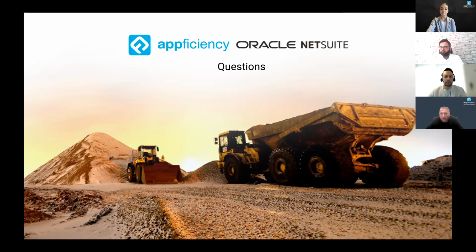So part of the demo that Joyce did for us, she mentioned that, hey, you have the option to override our calculation. So when you use the option, the setup is based on the override, you're technically using the fixed price setup. And if you don't override, the system is smart enough to understand that, okay, this is a cost plus contract. I need to calculate all the percentages based on the cost that you incurred to date.